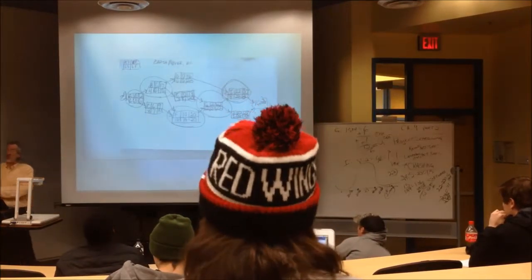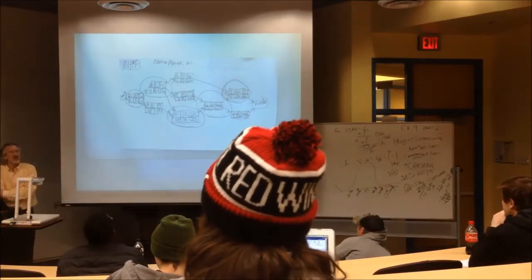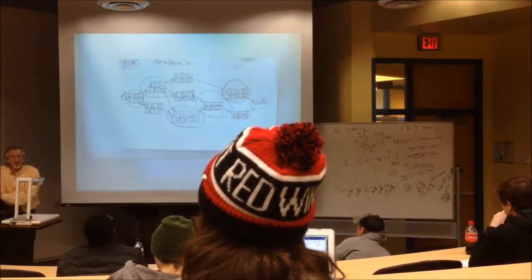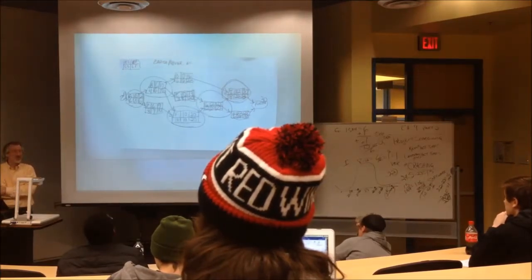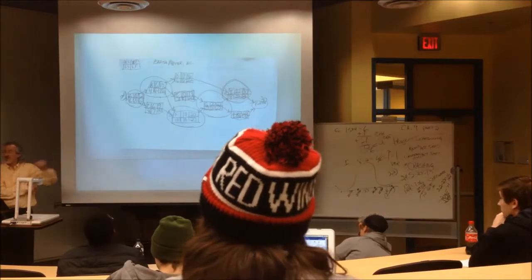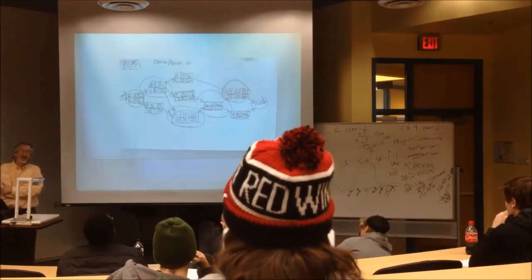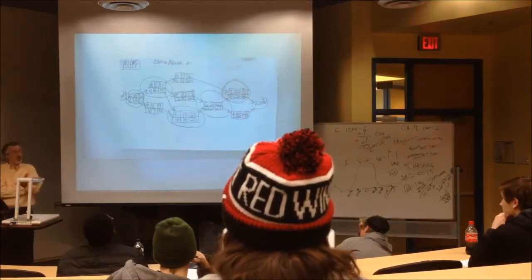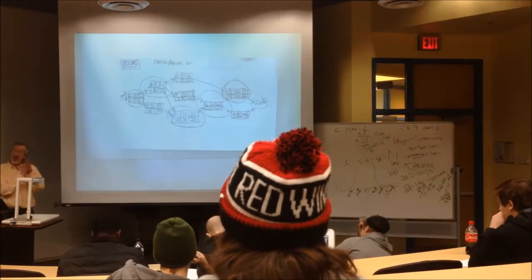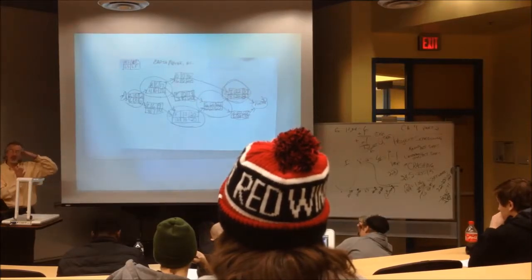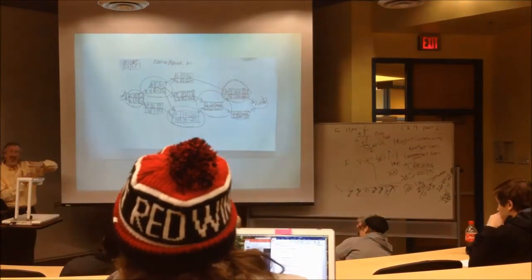Management's concerned this project could take more than 26 weeks. You come back with the recommendation that this project is expected to take how long? 30. So it's going to take more than 26 weeks. We already calculated we got to crash 4 activities. And the bad news is, don't get me wrong, sometimes you are crashing activities that are not critical, but you aren't really reducing the time of the project until you get through the slack.